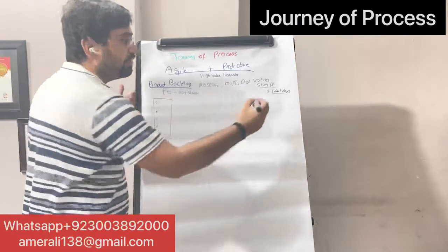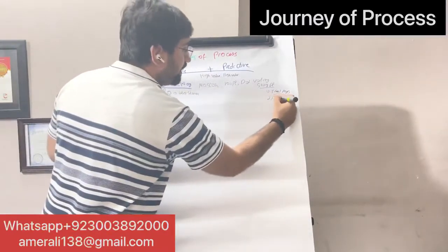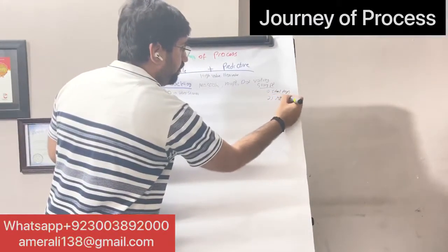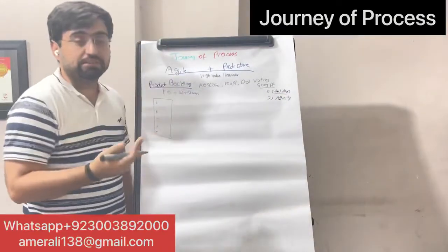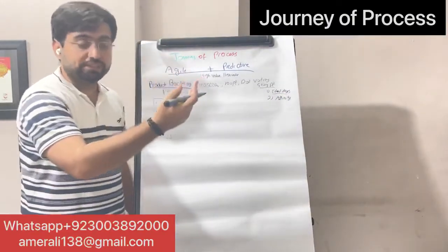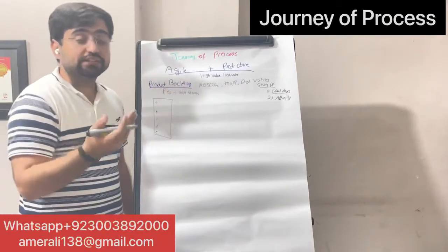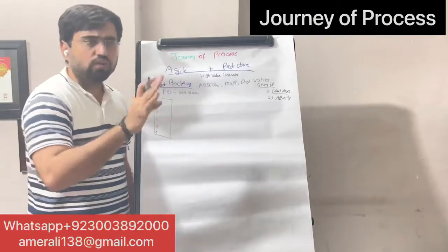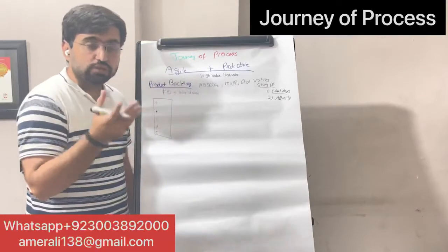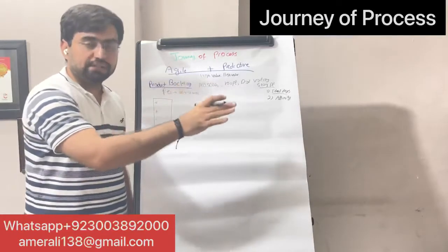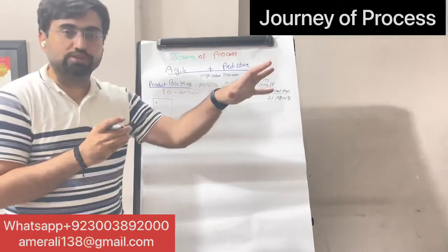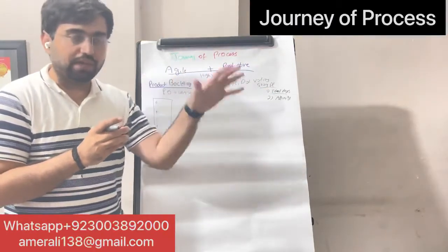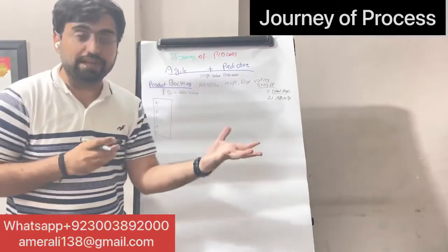So we have another estimation technique, the affinity estimation technique. Affinity estimation is really more of a relative estimation. We compare the estimations. We use t-shirt sizing. We cannot quantify the user stories, we compare them with each other. We say okay, this is a small t-shirt size, it's a small user story. This is a medium, large, XL, double XL.